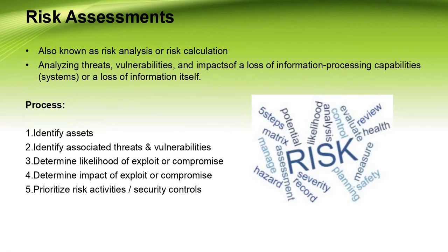Risk assessment. Recall that assessing risk is largely a function of threats, vulnerabilities, and impact. However, an important factor must be considered between the threat and vulnerabilities: the likelihood that a threat will occur to exploit a vulnerability. As a result, overall risk assessment consists of 5 steps. One is to identify threats, identify vulnerabilities, determine the likelihood of occurrence, determine the magnitude of impact, and determine the risk.